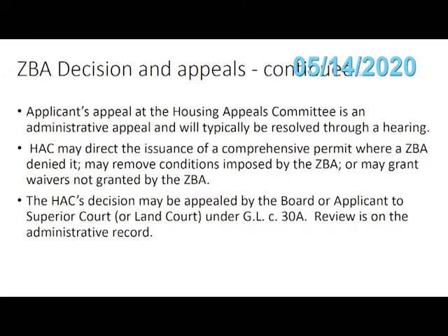Next slide, Angus. John, one of the questions that just came in through the chat is whether the costs related to abutter appeals factor into whether a project is uneconomic. That's a great question. No. The costs of an abutter appeal will be after the Board of Appeals renders its decision. So the applicant might try to introduce that at the Housing Appeals Committee, but that is a much different conversation than the one we're having tonight.